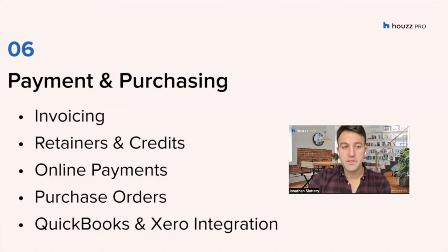With the payments and purchasing, it's a really powerful system that you can use. Once your estimates have been approved, you turn it into invoicing, and then you can get progress payments set up. So once the estimate has been approved, 10% on signing the job, so I can begin ordering materials. Then once the demolition aspect of the job has been completed, another 20%. Once the fit out's been done, so on and so forth. And again, it goes back to that communication with the client.